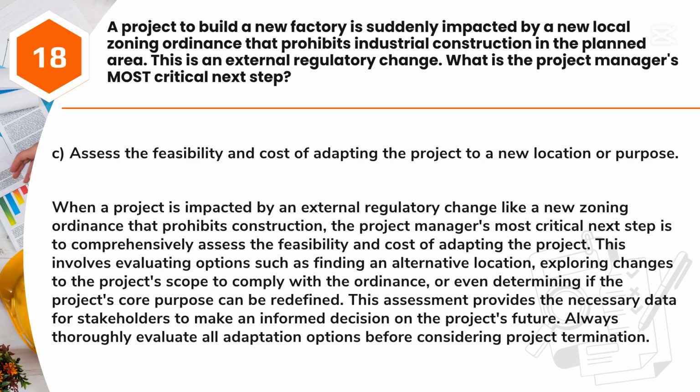Answer: C. Assess the feasibility and cost of adapting the project to a new location or purpose. When a project is impacted by an external regulatory change like a new zoning ordinance that prohibits construction, the project manager's most critical next step is to comprehensively assess the feasibility and cost of adapting the project.